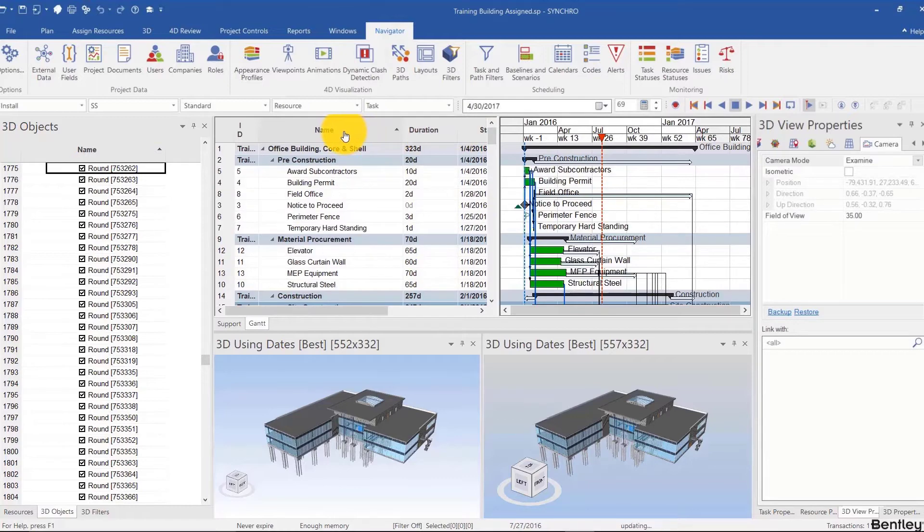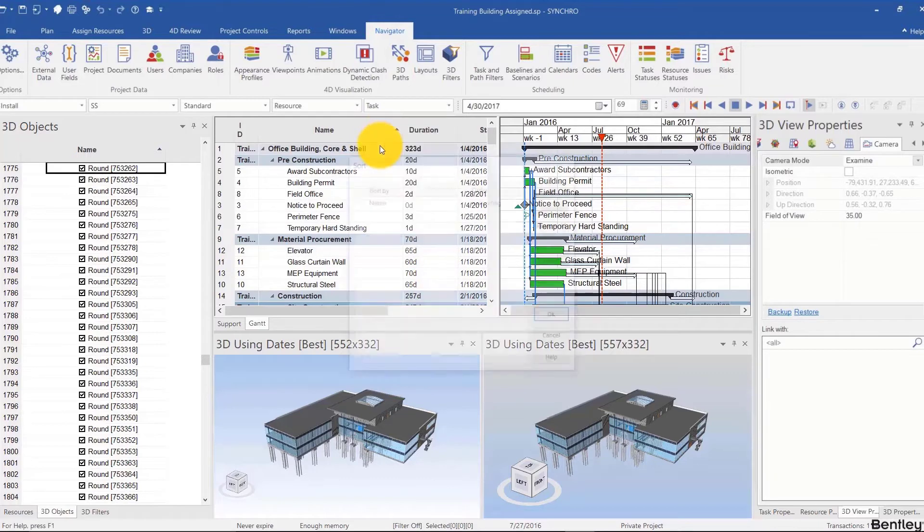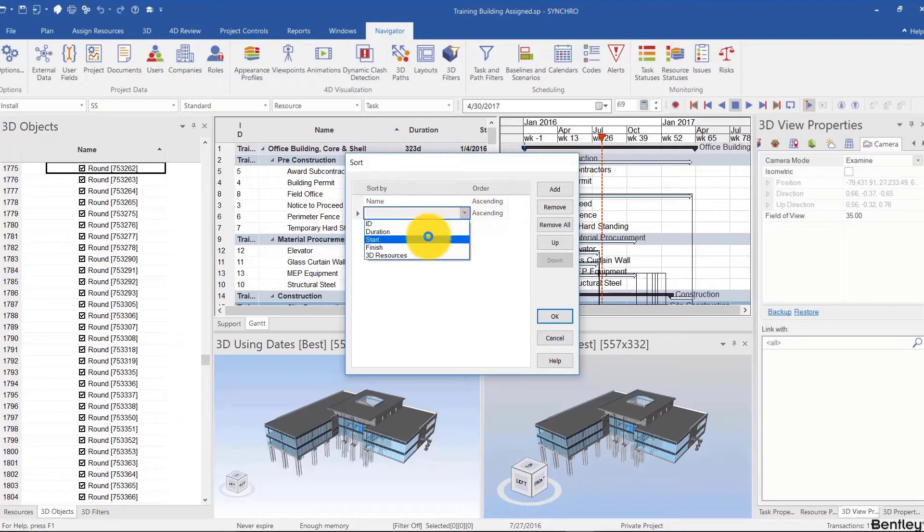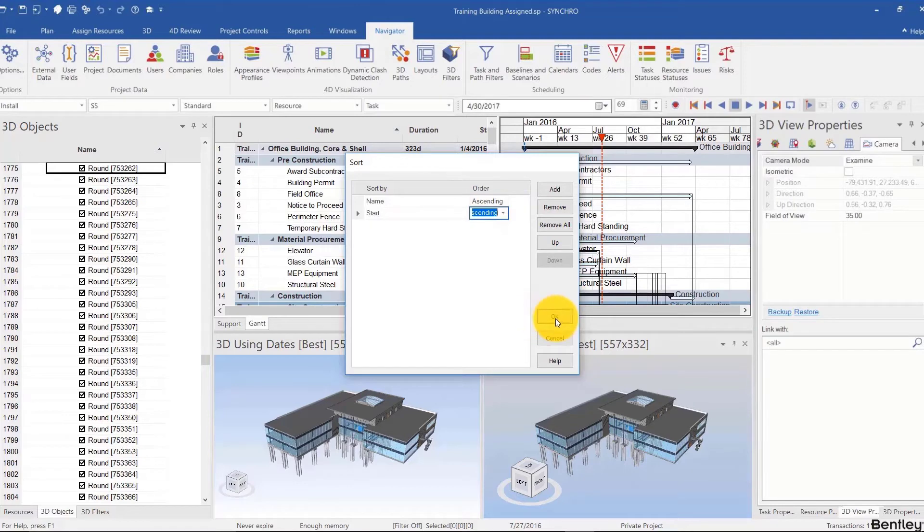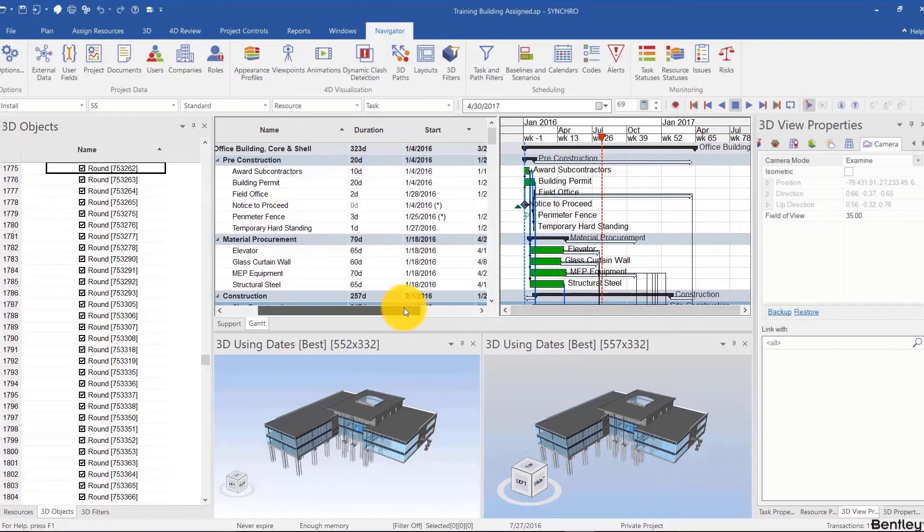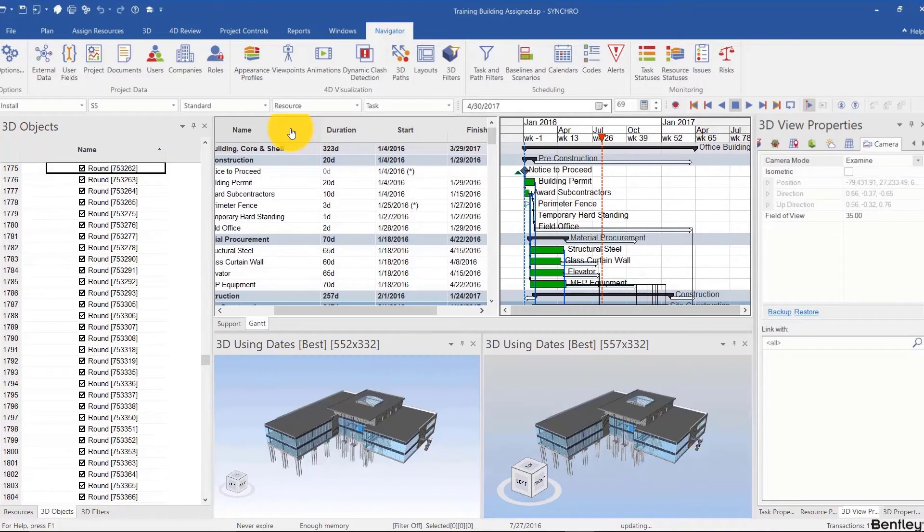If you click on one column and then the next, it only sorts by one at a time. However, if you right-click and sort, you can sort by multiple columns simultaneously—for example, by name ascending and then by start descending.